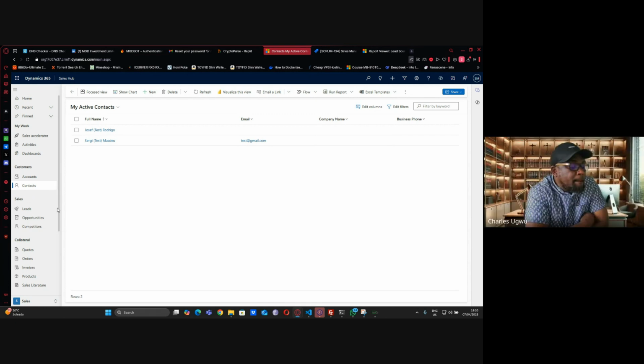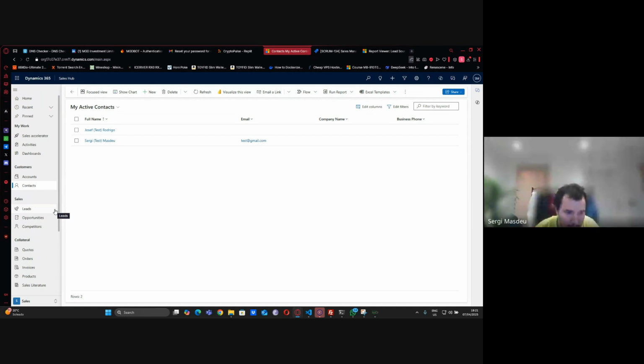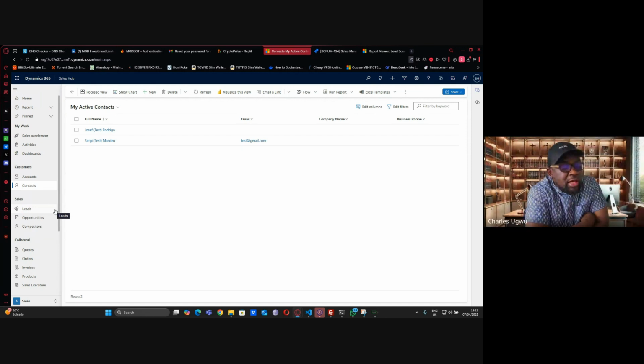So the purpose of what we are doing is to make sure that all the items we commit to the sprint, like all the user stories, are working. Any that doesn't work becomes part of the work for the next sprint. Do you have a copy of the product backlog?